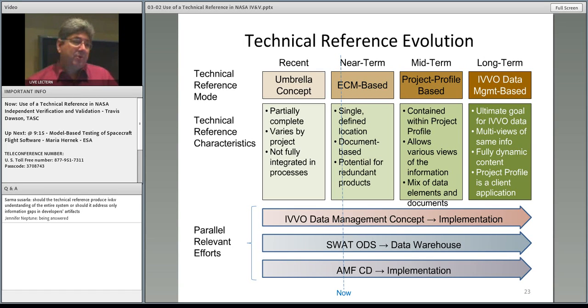I will say though, in terms of evaluating the goodness of the criteria, that is a significant effort in and of itself. In other words, I referred to the architecture analysis criteria development effort. That took two or three very senior and experienced folks a significant number of months to develop. Now, not 40-hour-week kind of months, but it took them several months. And so when you're talking about a significant domain and starting from somewhat a clean sheet of paper, it's a significant effort. So there's got to be a lot of review, et cetera.